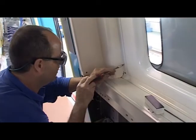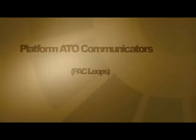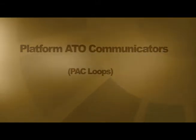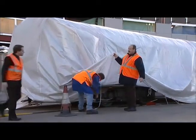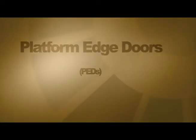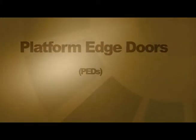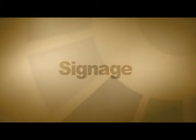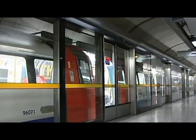Typically, the kind of work we are talking about here includes the 17 PAC loops at 11 different locations, which will be converted for 7-car operation. This will include the covering of 6-car and the uncovering of 7-car stop diamonds and chevrons. There are 17 sets of PEDs at 8 locations, and all of these will be modified during the line closure so as to bring into use the 7th set of doors. One sign will be uncovered and another covered at the same site to ensure they are suitable for 7th car operation.